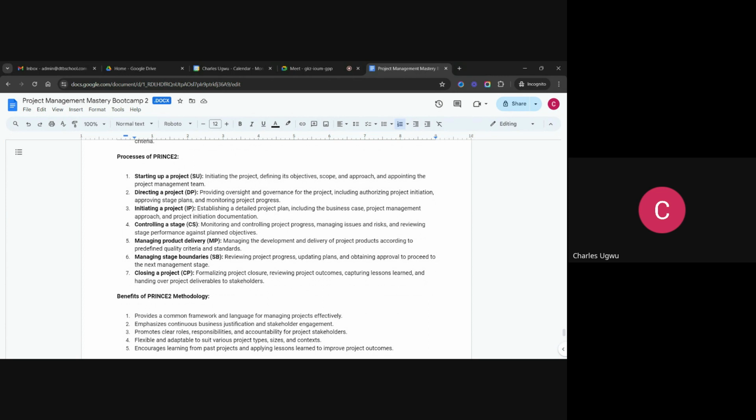Like what we're doing, that's why it's important that we know how to document our status. Every week, as a good project manager working within Waterfall or PRINCE2, it depends, but the way I've been doing it where I've been working, we have what we call weekly status reports, where you report every deliverable, and it must be approved. If you are working within this environment, either PRINCE2 or Waterfall, the deliverable must be approved before you can move to the next stage.